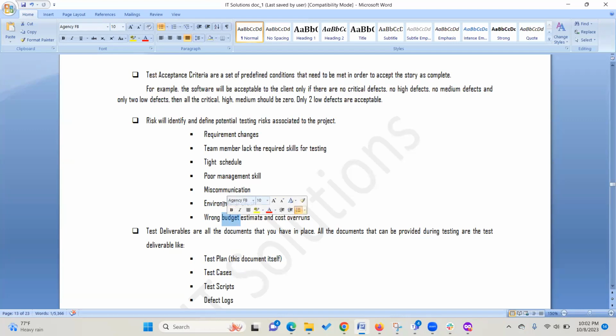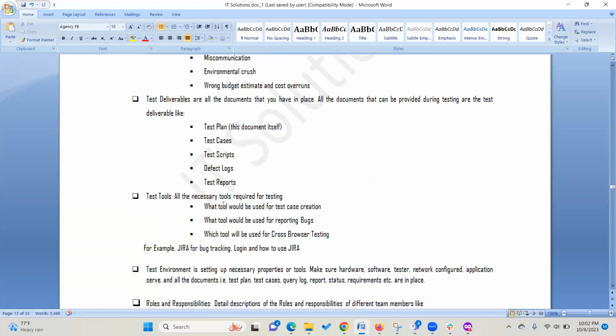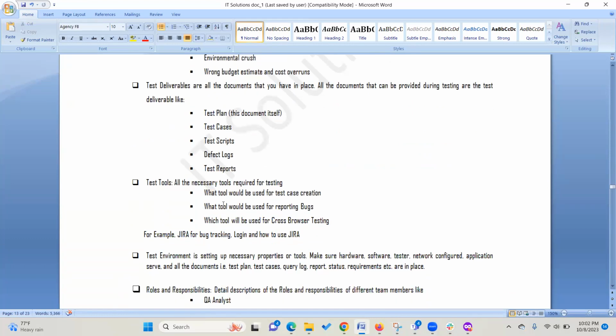So that's a risk that we need to highlight, and often we see that. The timeline is given, but we're not able to meet the timeline. So when we look at the project, we should be able to say, hey, yes, you committed to this deadline, but this is a risk. I think it's going to be very tight. So we should have a backup. And what is the backup? They would start the communication with the client saying, hey, the timeline could be at risk. We need to think about extending it. And if there is room to extend, they will extend.